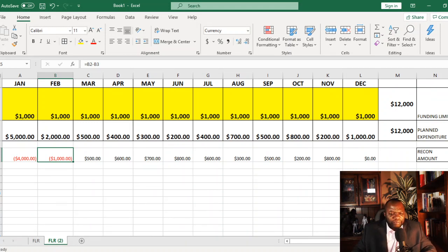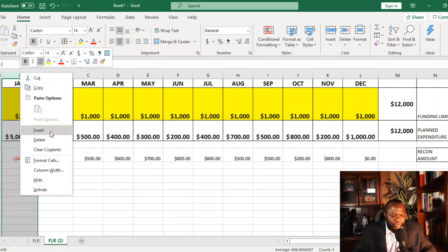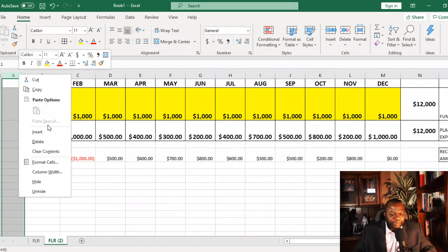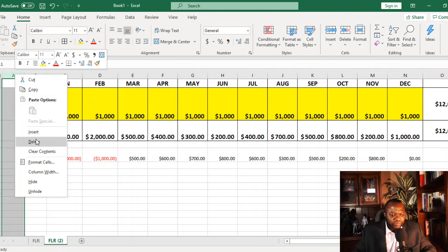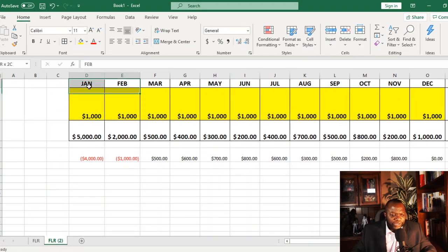Now, someone might say, but this is equipment, machinery that we need for the project. This is an upfront expense. What do we do? Well, you know what to do. You're going to have to reschedule. Possibly you start your project early. You go a few months back.